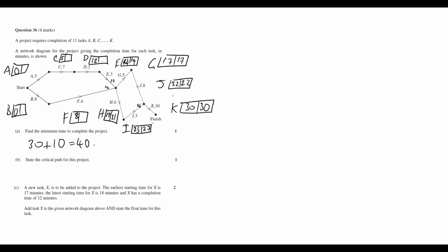And then as we continue through this top row, we see that all the numbers are actually the same as we go through, subtracting the task duration from the latest start time of the previous one, remember, in terms of backward scanning. So for part C, it's now 5, 5. And for A, it's 0, 0.